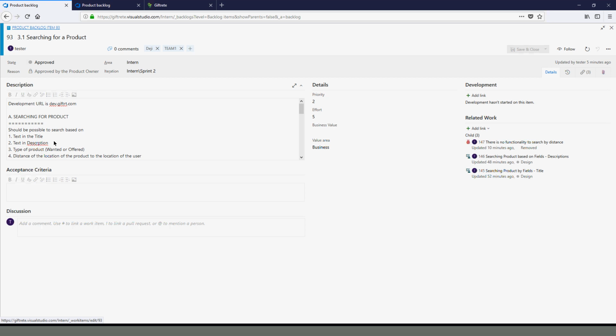The cards are already written in Fibonacci: 1, 2, 3, 5, 8, 11, and on and on like that. So you say, okay, answers ready, bring your card out. You bring the number that you think the story is commensurate to. If you think it's 5, you bring it. Everyone brings it at the same time.